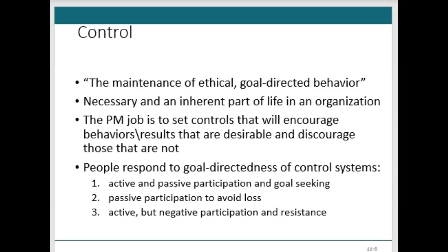Murphy's Law, right, comes to mind. And most of us already know what that is. Parkinson's Law, right, where we complete a task early, but then just kind of sit on it, not really developing it, right? We lose control. And student syndrome, when we wait till the end, but we know we have a due date to the project manager, so we rush through it to make sure it gets done on time, right?